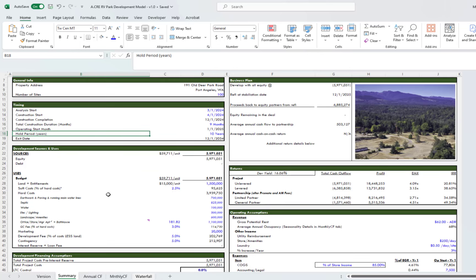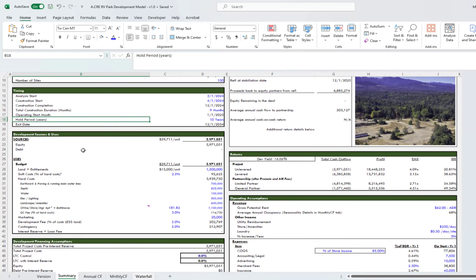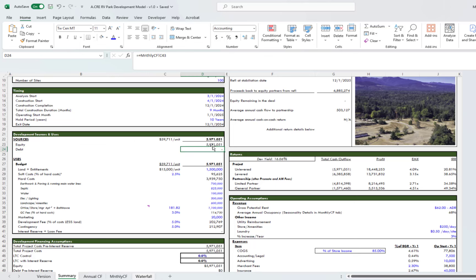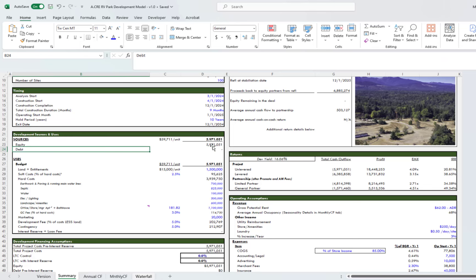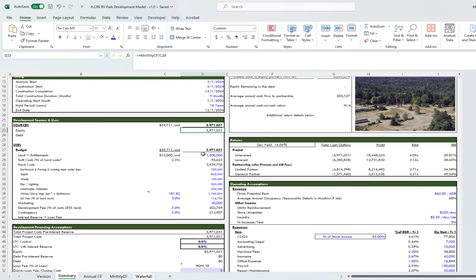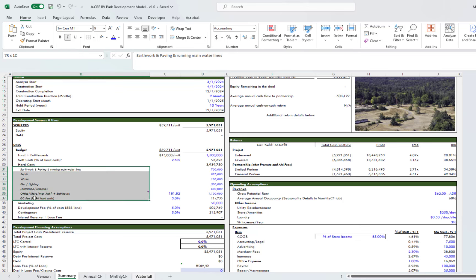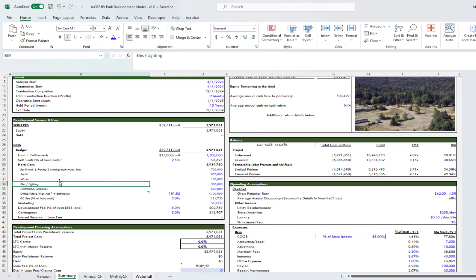Below here you have your sources and uses. The particular project that you're looking at here is actually a live deal. While there's equity, there is no debt, and the reason is we are trying to go out and raise all equity for this project just based on the current interest rate environment. Interest rates are high and construction loans are almost always floating rate debt, so we want to avoid any type of interest rate risk. What you're seeing here is all equity, and then we have your budget here. You put in your budget line items here. While this is black text, you can update any of this stuff. It doesn't impact the model, so this is just particular for our deal.